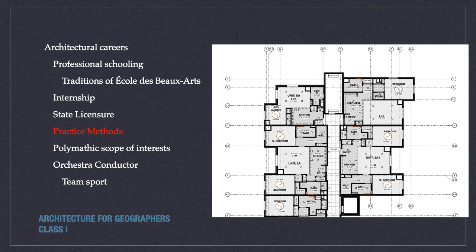The second phase of design is called design development, and here the audience is the design team itself. This is where the engineers typically get involved for the most part, and we're now working out and making this schematic design a buildable object so that the engineering is worked out, the dimensions of spaces include all the thicknesses of all the materials that are being used, and it comes together in an object that is able to be constructed.